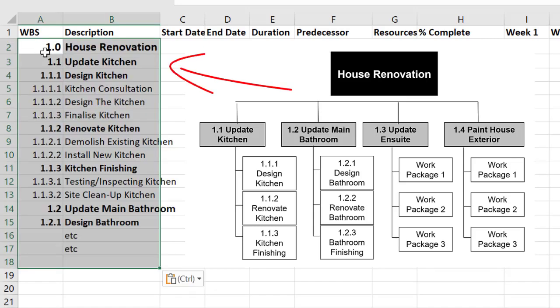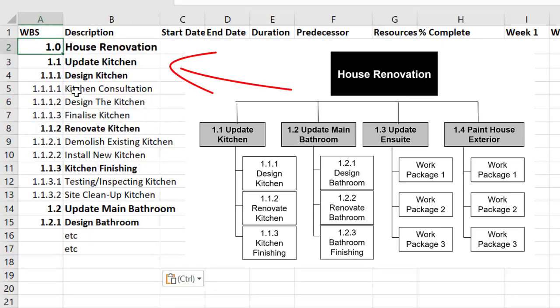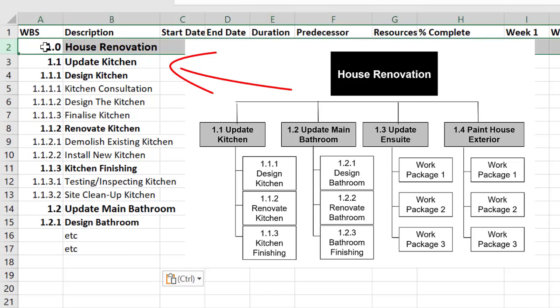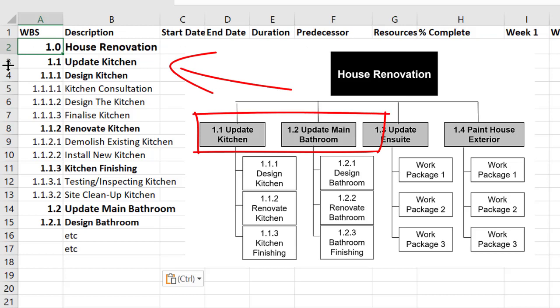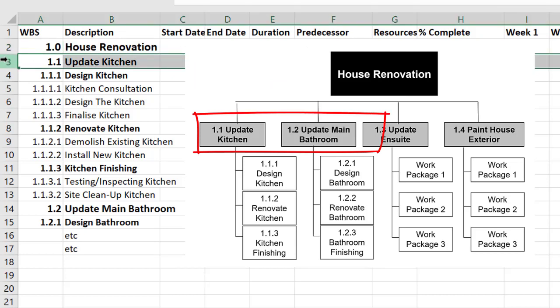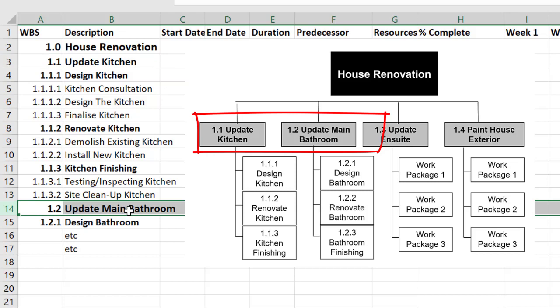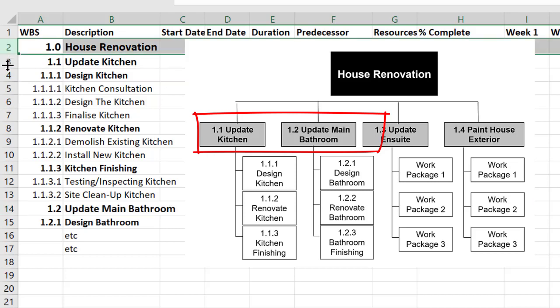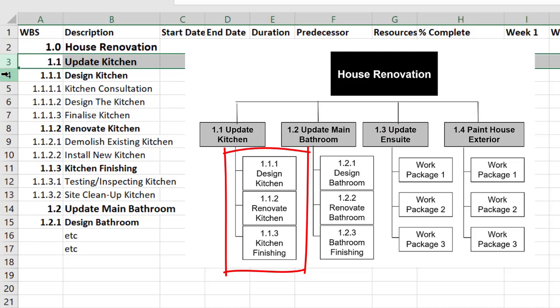So here's my work breakdown structure or at least part of it and the overall project is a house renovation so that's coded as one. The first deliverable is to update the kitchen and down here the second deliverable is to update the main bathroom.